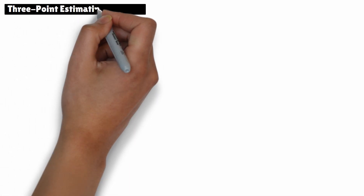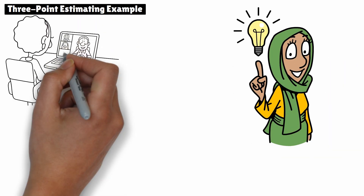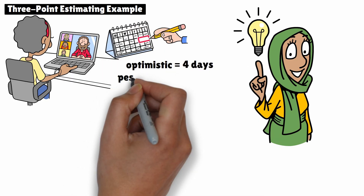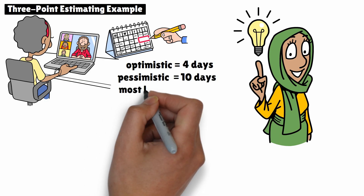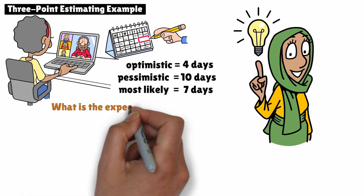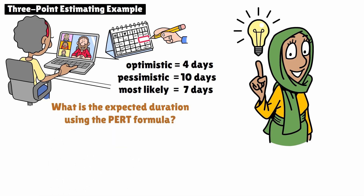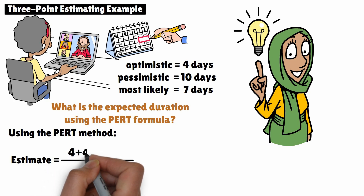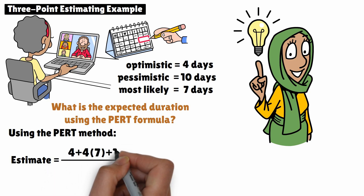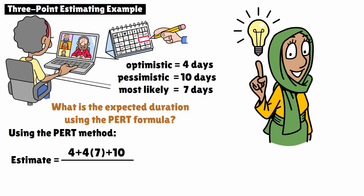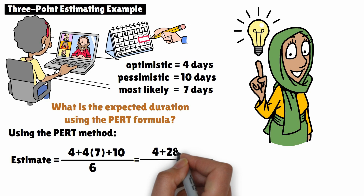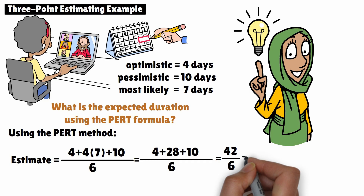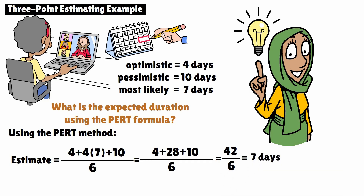Let's take a look at an example. A project manager is estimating the duration of a task. The optimistic duration is four days, the pessimistic duration is ten days, and the most likely duration is seven days. What is the expected duration using the PERT formula? Using the PERT method, the estimate equals four (optimistic) plus four times seven (most likely) plus ten (pessimistic), divided by six. This becomes four plus 28 plus 10, divided by six, which equals 42 divided by six — the result is seven days.